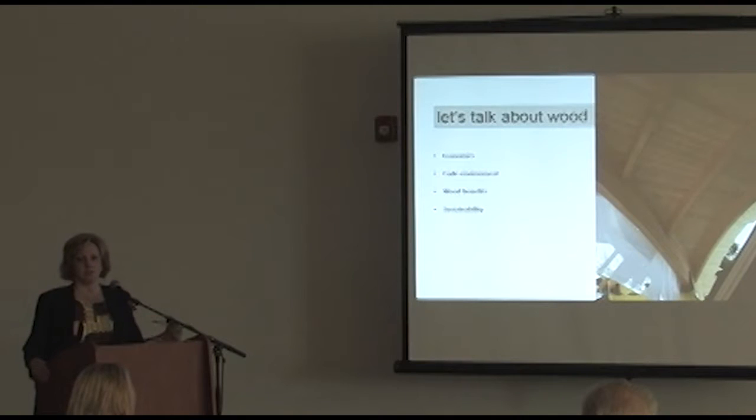Tripp did some calculations. If we did that type of wood, where would we have to get it? How much would we have to pay for it? And it's not just the cost that you would have paid, but it's where you shipped it from, and you're sitting in the middle of wood country. And so we said, no, we're not going to have FSC certified wood, but the material was sustainably harvested under